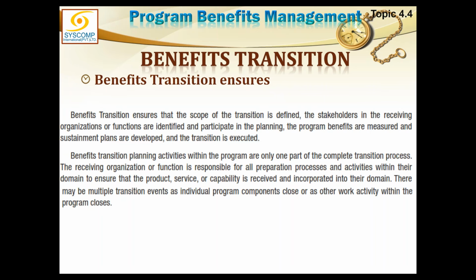Benefit transition planning activities within the program are only one part of the complete transition process. The receiving organization or function is responsible for all preparations, processes and activities within their domain to ensure the product, service or capability is received and incorporated into their domain. There may be multiple transition events as individual program components close or as other work activity within the program closes.